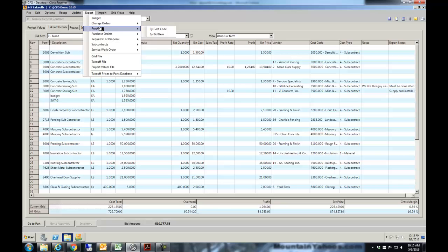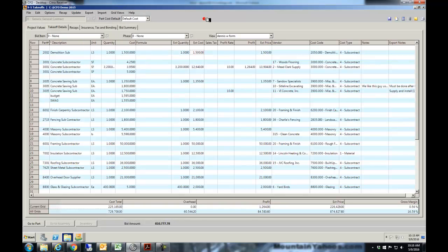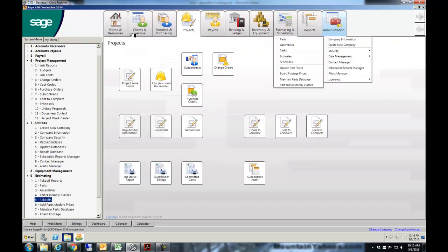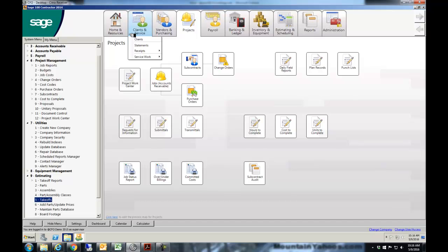It's going to allow you to print a proposal, print all the purchase orders that you want, and print the subcontracts directly from here. So your committed cost is automatically created from the efforts that you did in the estimating. That integration is pretty tight. There's no more rekeying of subcontracts or purchase orders after you're awarded the job. To me, that is real full integration, not only to accounting, but also to some of the operations side as well.